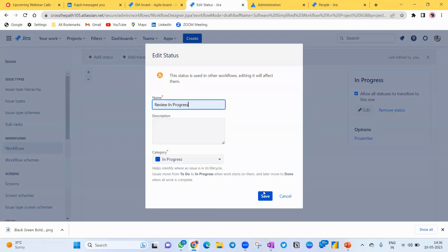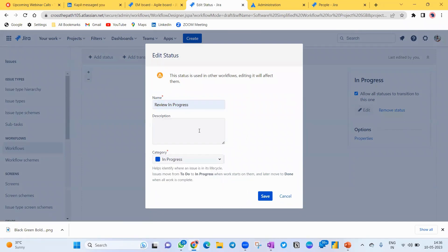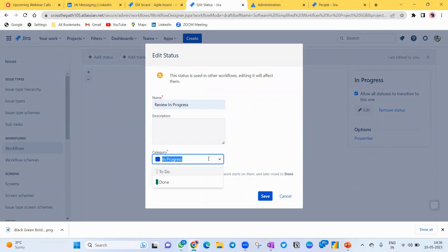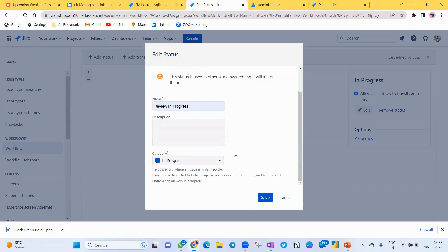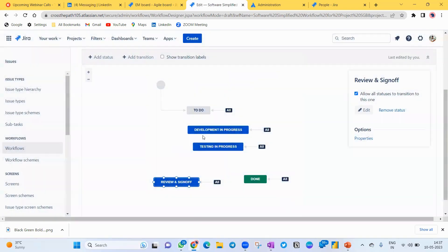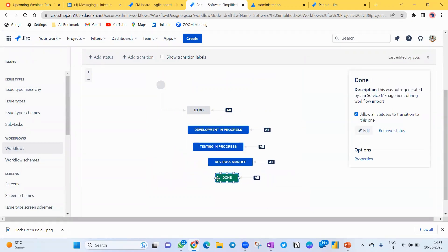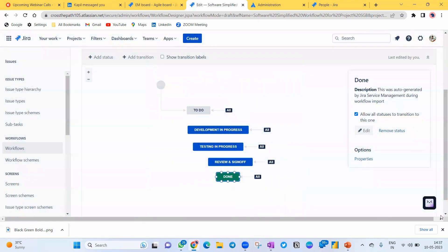You can also add a Review In Progress column. You'll notice that each column has a category — 'In Progress', 'To Do', or 'Done'. Whatever is In Progress will always remain in that category; it cannot be To Do or Done because work is actively happening there. Similarly, a Done column cannot be In Progress or To Do — it will always be Done. That's why we select the correct category for each column.